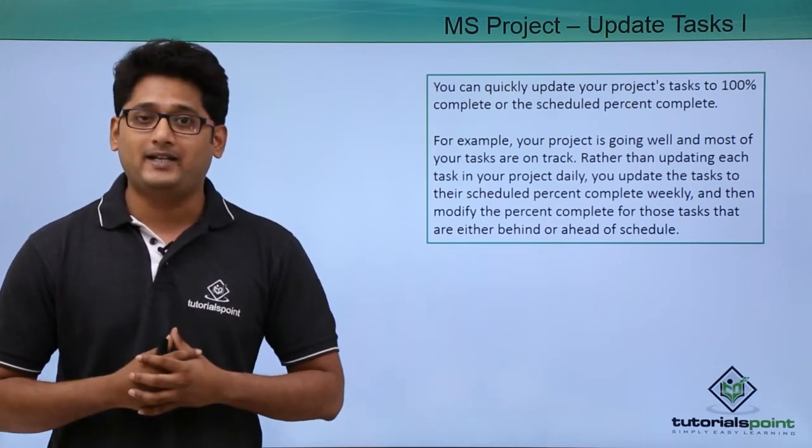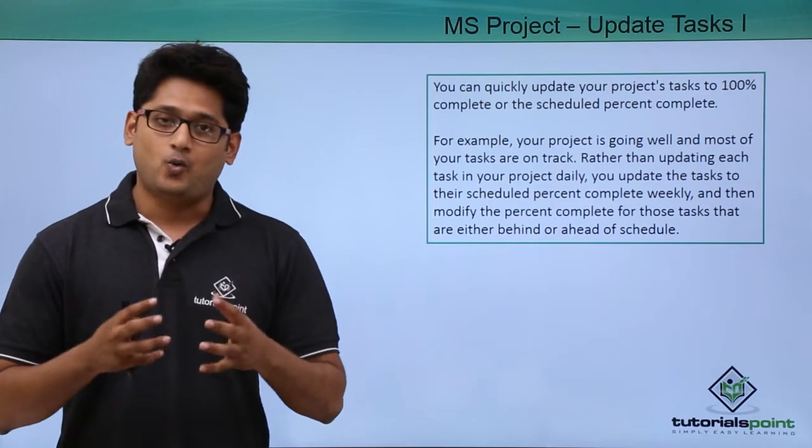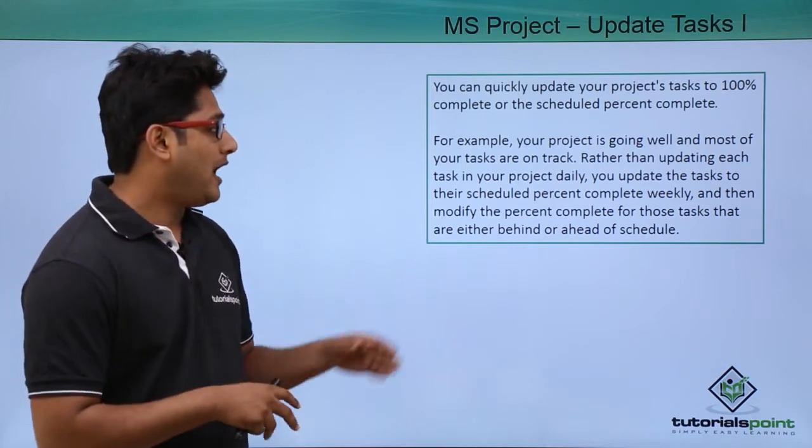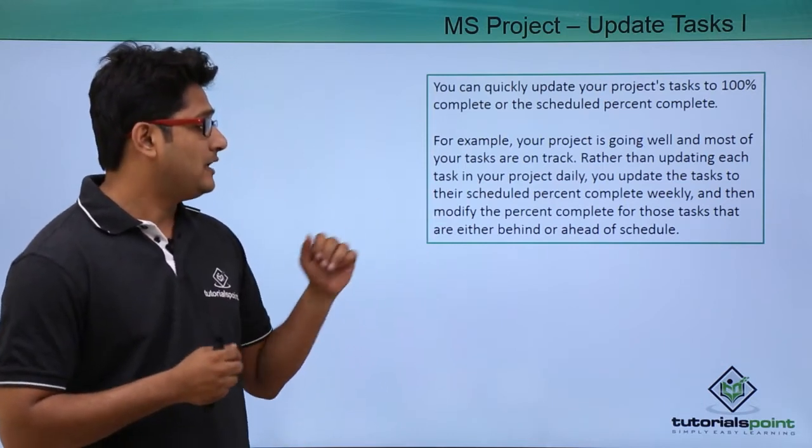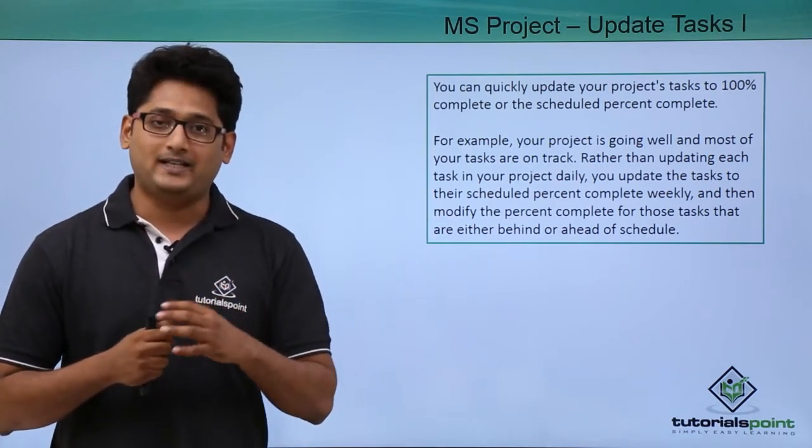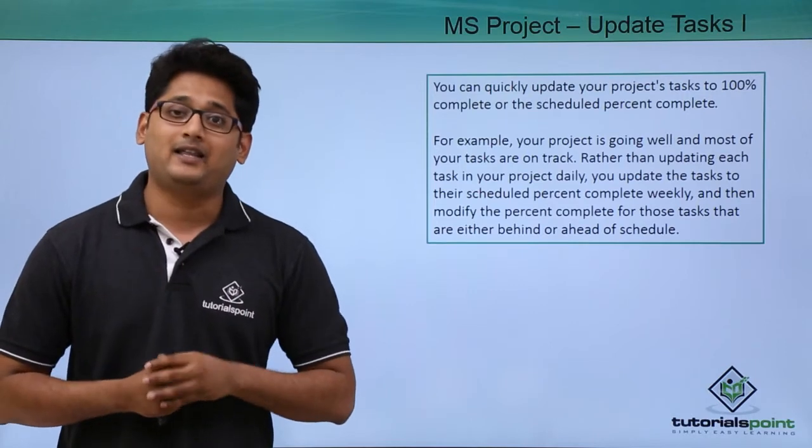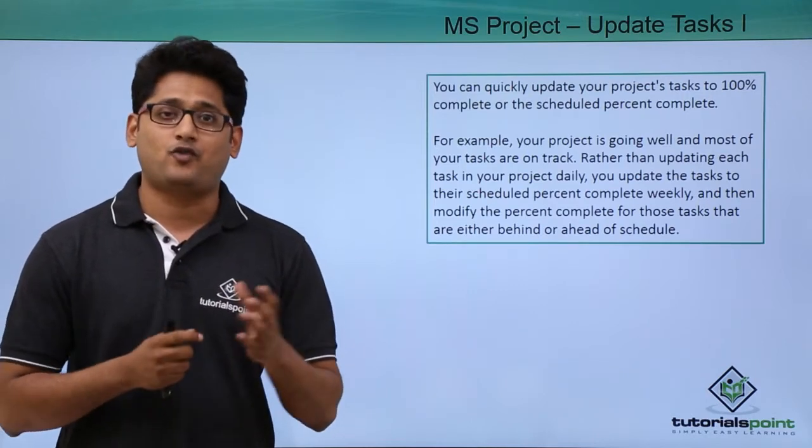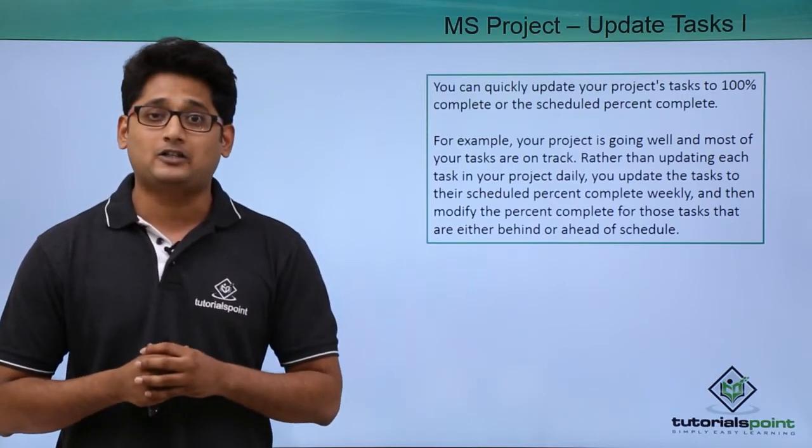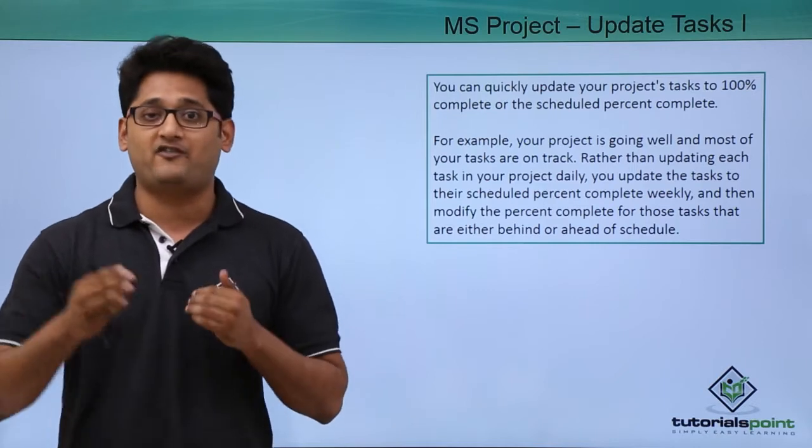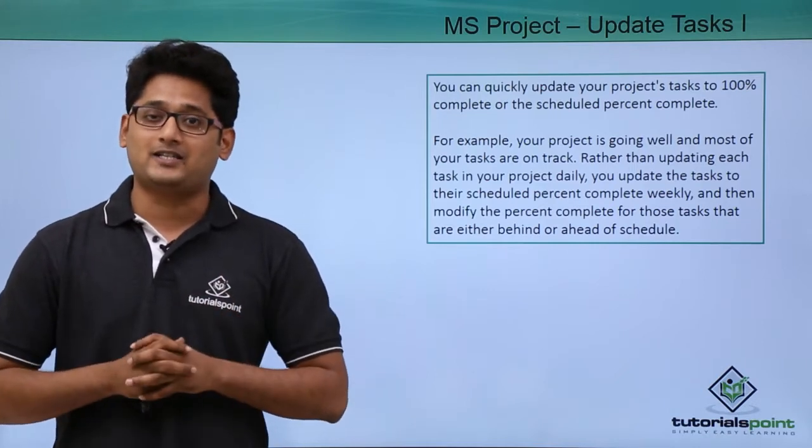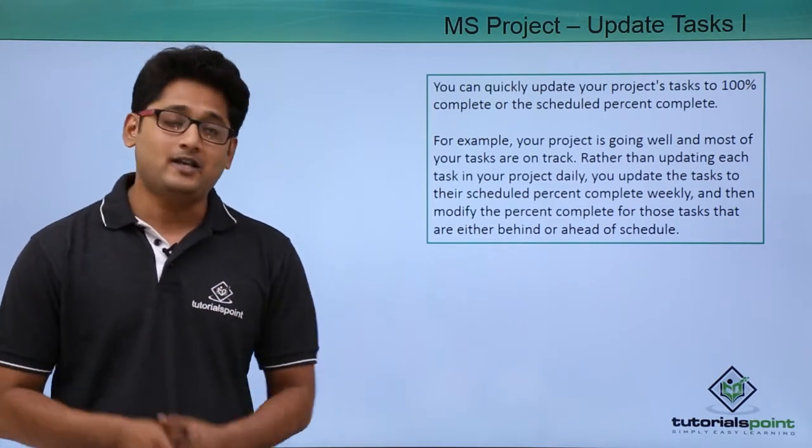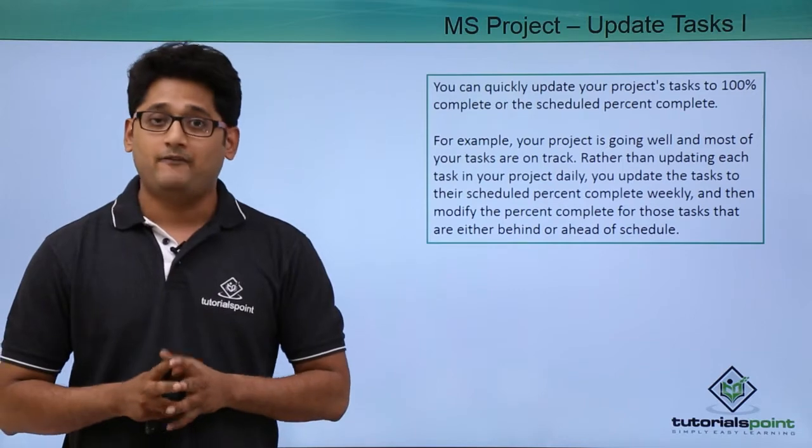Now instead of updating the task on a daily basis, what will I do? I will update the task to their schedule percent complete weekly and then if I have to make changes for a particular task which are falling behind or which are way ahead, I can manually adjust them using this particular menu.